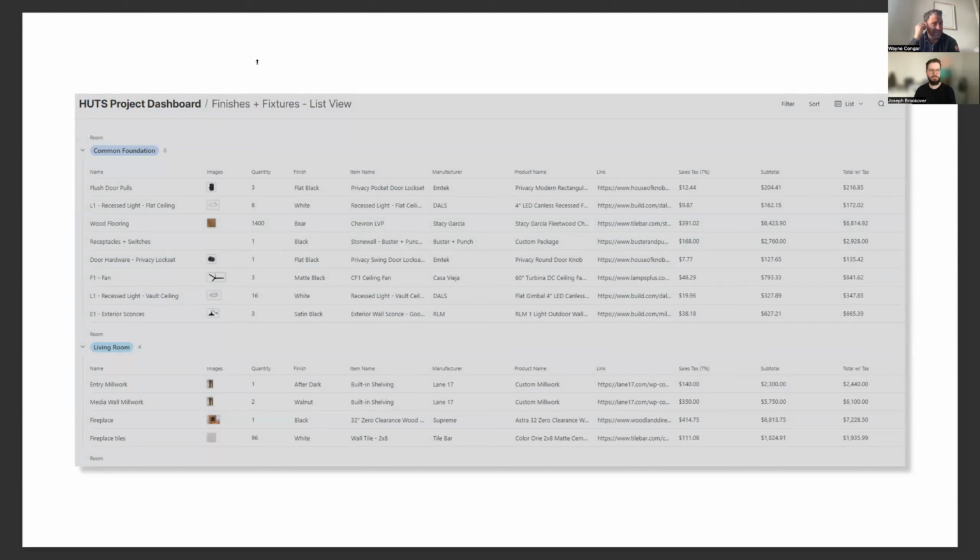so that you don't end up with the condition like Joe was hinting to of, great, we've got the toilet here and we have the sink here, but the bathroom tile is not down on the floor, so we can't install those yet. And then it's like, oh, nobody ever selected bathroom tile. The tile I did want has a 4-month lead time. I guess we're just waiting until then. These are the things that during construction frustrate people to no end, where they still have the design idea of what it is, but the operations of how to get it done aren't in place.